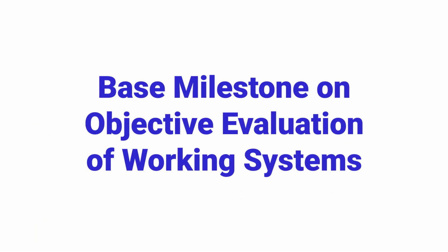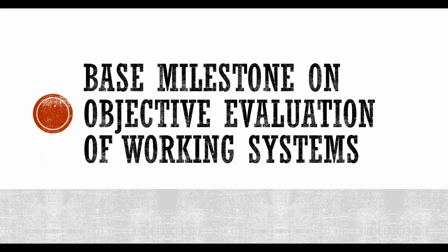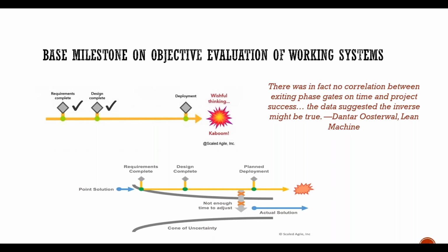Now the next principle is to base milestones on objective evaluation of working systems. Here we are aware of phase gate milestones. In waterfall development, we have phase gates: the requirements complete phase gate, then the design complete, then the code complete, then the test complete, then the deployment complete, and so on. And that is your first picture, which is shown here.